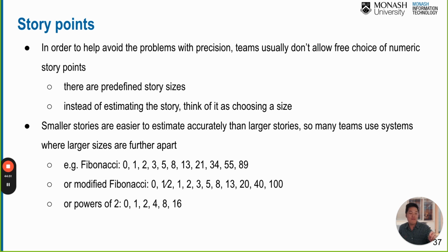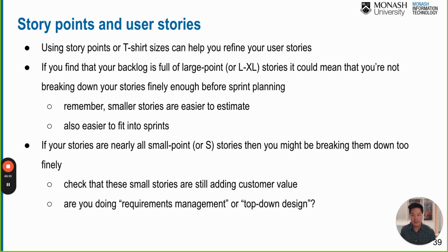This is not really good planning, right? Because we really don't know what is inside that user story of 89, okay? Do you know what I mean? That's why we need to break it down into smaller items. Make sure that it can be moved around within a day or so, that kind of thing, yeah? And then you can see the progress of the team every day, moving nicely, yep?